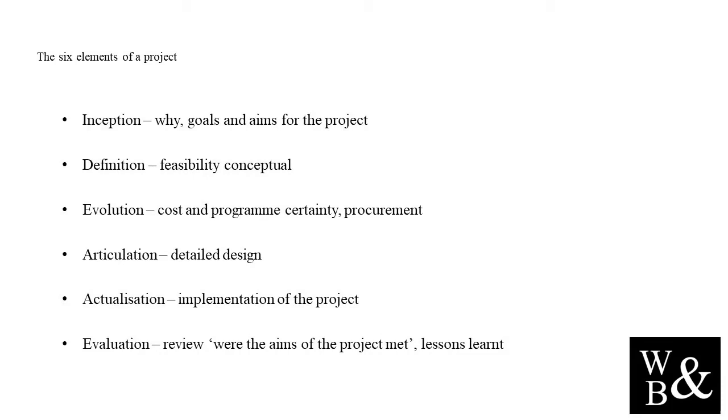Another key part to this element is risk identification. This includes health and safety risks as well as project risks. In this element, you will develop a register of assumptions, which will need to be defined in the next element, and decisions made during this element as much as possible.